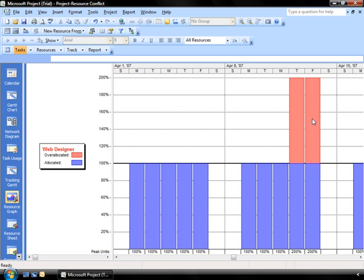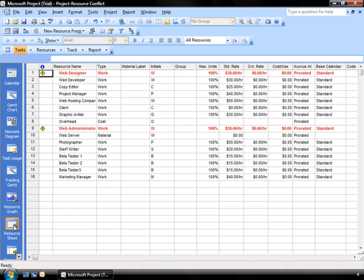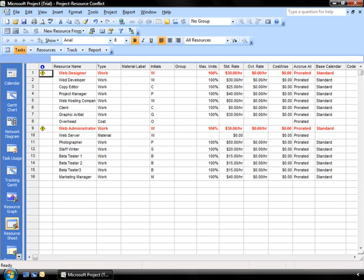Another way I could see the same information is on my resource sheet. So if I click on my resource sheet, it presents me with all the resources in my project. And again, it's highlighting two places where I have over-allocated individuals. Not only have I done it with the web designer, but I've done it with the web administrator. So this particular view is very handy. It gives me an overall view of where I may have over-allocated my resources, where the graph that I was looking at previously just identifies the days where I've made the faux pas. So anything that's bolded in red is an over-allocation.